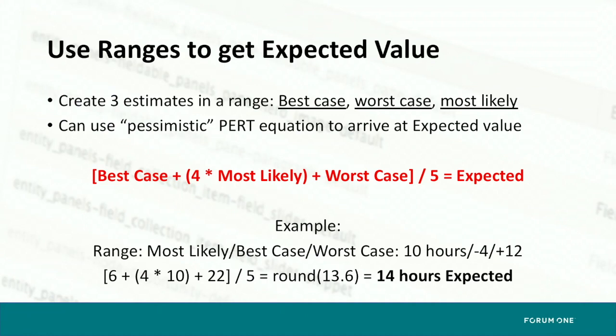less than 1 hour, because it takes me that long to create a new feature branch. Pull down all the current feature branches, create a new feature branch, merge that feature branch after I do my changes, push that feature branch up to development, review it on development, create a pull request in Git to move it from development to staging, and then, if I'm doing the production deployment, do a production deployment, which involves creating a backup copy of the database, alerting sysadmins, the whole business. So really, I think 1 hour is maybe optimistic. It may be more like a 2-hour overhead for any change to a software system that's going to end up on a production server.